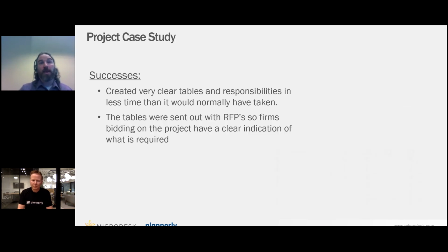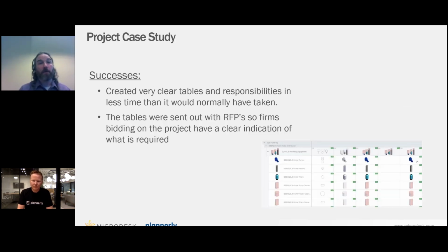The other thing is, when we had these tables created, these were sent out with the RFPs. So people who were bidding on this saw right from the get-go what was expected. They were able to start communicating on this. So it's not like, okay, wait a minute, we didn't know this. No, we gave you a graphic, and you can actually communicate on that. So everybody, again, right from the beginning, we're all talking about the same thing. So that's streamlining that process.